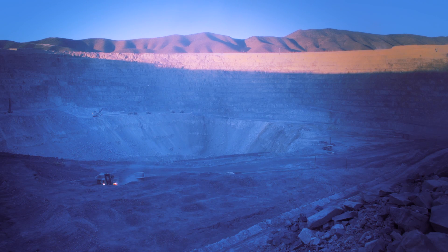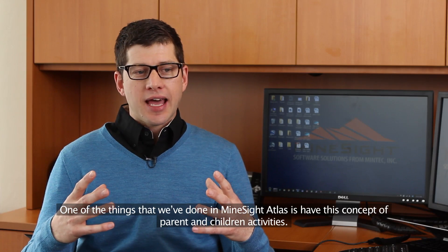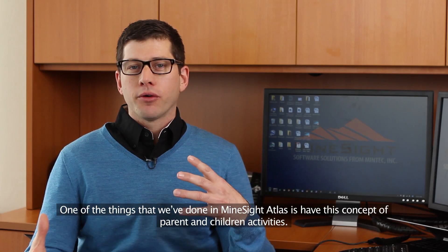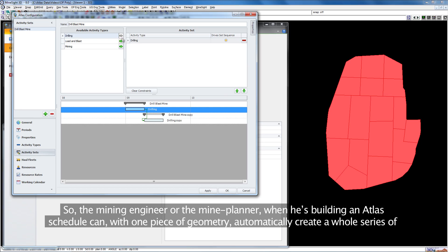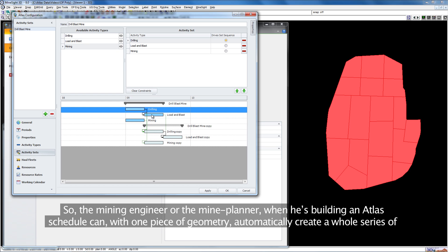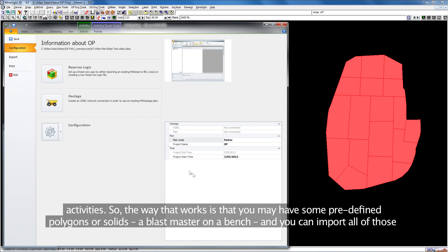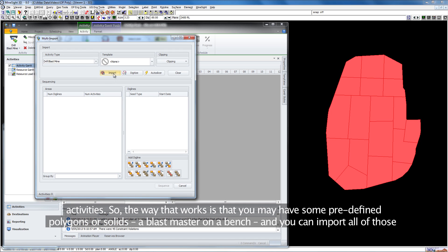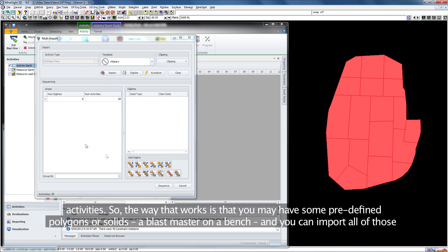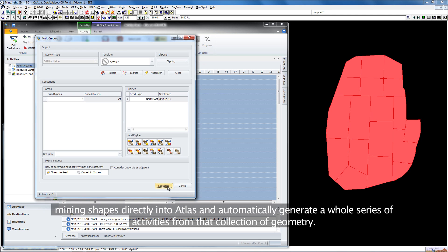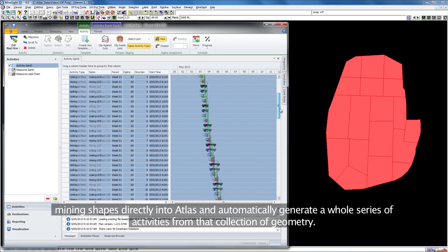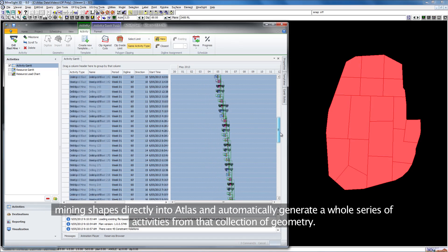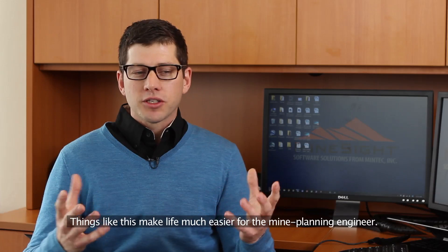One thing we've done in Mindset Atlas is have this concept of parent and children activities. The mining engineer or mine planner, when building an Atlas schedule, can with one piece of geometry automatically create a whole series of activities. You may have some predefined polygons or solids, a blast pattern on a bench, and you can import all of those mining shapes directly into Atlas and automatically generate a whole series of activities from that collection of geometry.